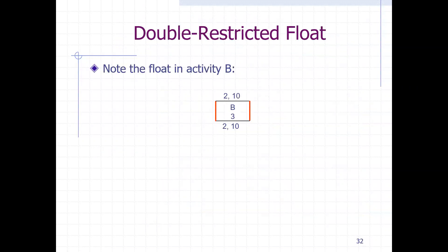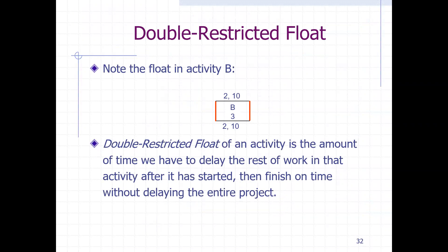So what is the double-restricted float? The double-restricted float, by definition, is the amount of time we have to delay the rest of the work in that activity after it has started, then finish on time without delaying the entire project.